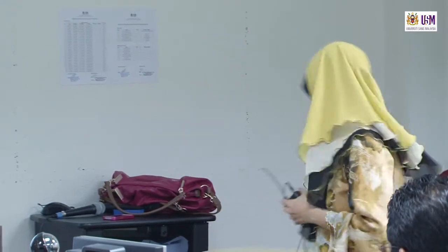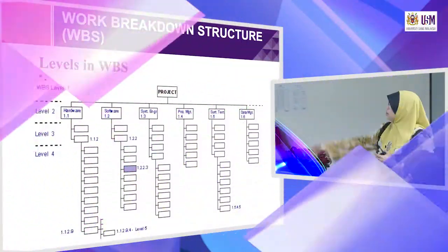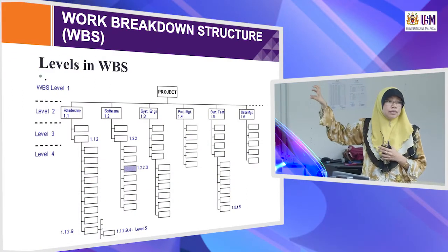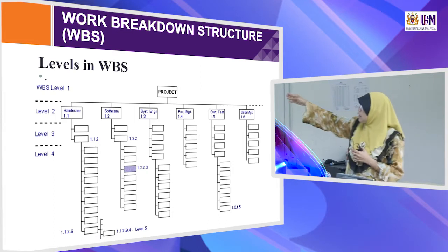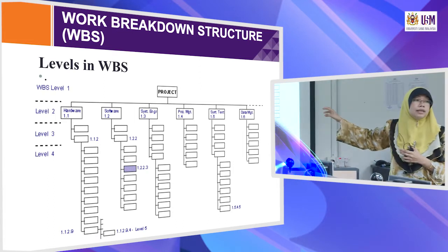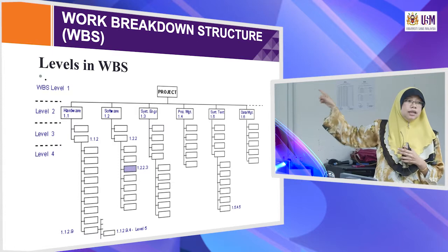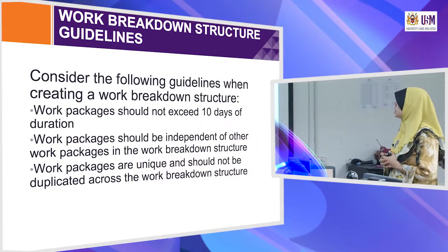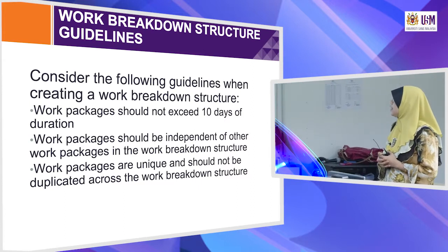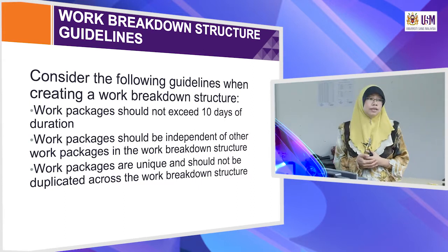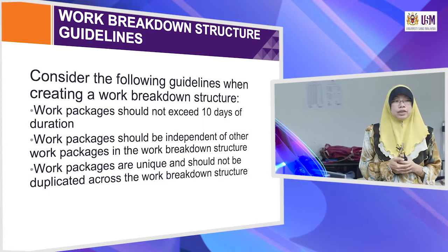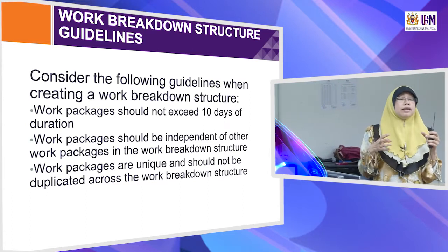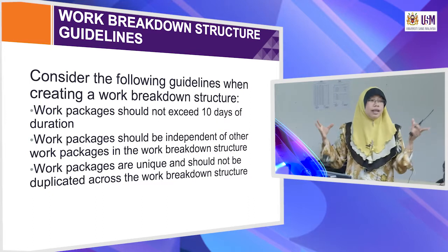One package, level 2, hardware 1.1. That is the package. Under hardware, what other packages are included in the hardware? You must also consider that work packages should not exceed 10 days of duration. That is important. In your seminar, one task, I think, is already more than 10 days.